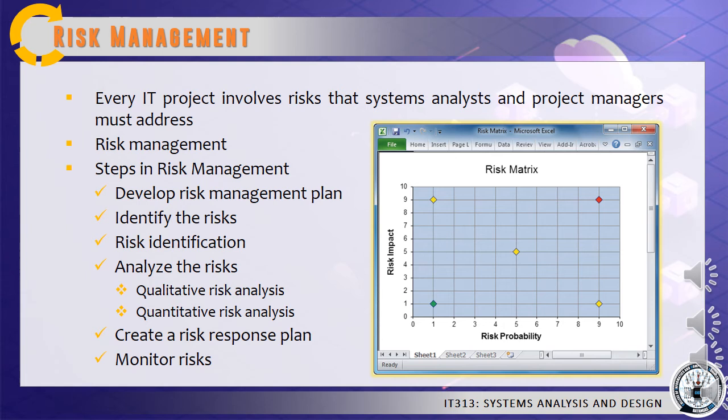The purpose of a quantitative risk analysis is to understand the actual impact in terms of dollars, time, project scope, or quality. Quantitative risk analysis can involve a modeling process called what-if analysis, which allows a project manager to vary one or more elements in a model to measure the effect on other elements.